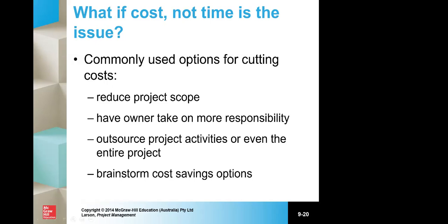Or you might say to the owner of the project, say if you're undertaking a project for a business, and the business owner says, I want to do this now not in 15 days, I want to do it in 12. And you might say, well, we can do it in 12, but you need to do 3 days worth of work yourself. In other words, we basically give you more responsibility, make some more key decisions, or just shift the costs onto them. They may be happy to share the costs. You might decide to outsource the project or a significant component of it.